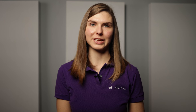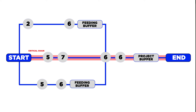Step two: identify and remove resource constraints that could put off the project deadline. Step three: at the end of the project, place a portion of the reduced time as a project buffer. Step four: insert a feeding buffer where the non-critical path and the critical path meet. Step five: place resource buffers to protect the critical chain. Step six: a project manager will insert the capacity buffers.